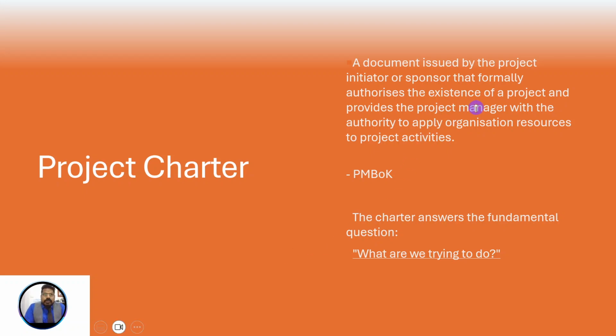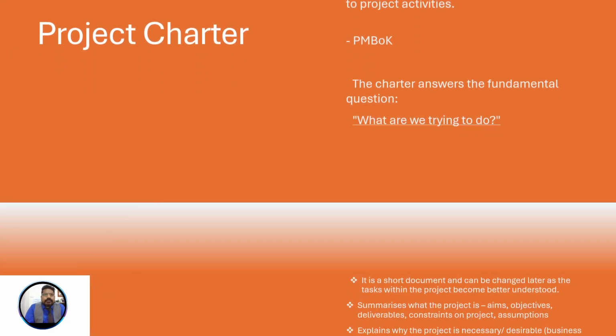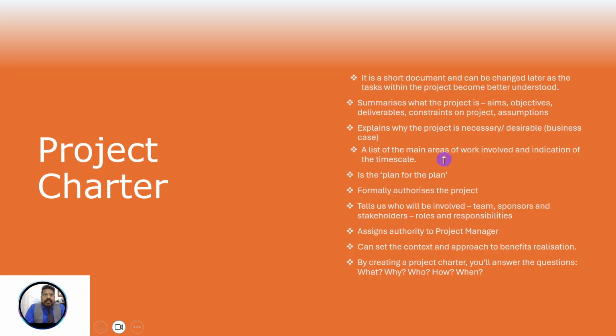It is a document issued by the project initiator or sponsor that formally authorizes the existence of a project. You are formally authorized to start a project because the project sponsor has clearly gone through the needs assessment, feasibility study, and business case, and he is okay to start this project. And hence, this is known as project charter. It's a short document and can be changed later with limited changes.